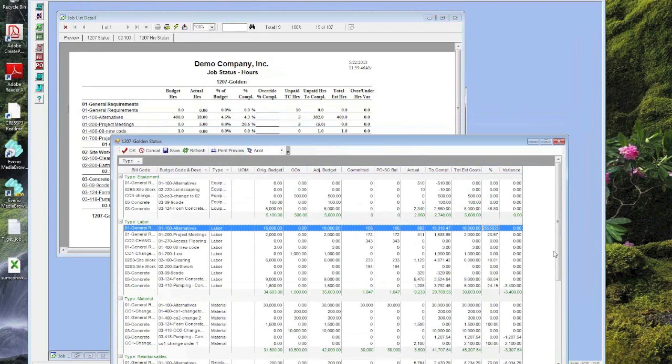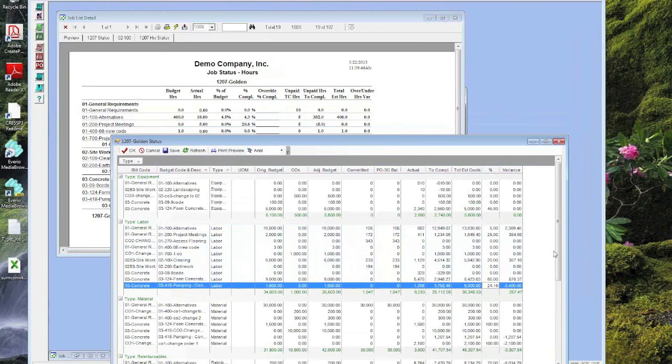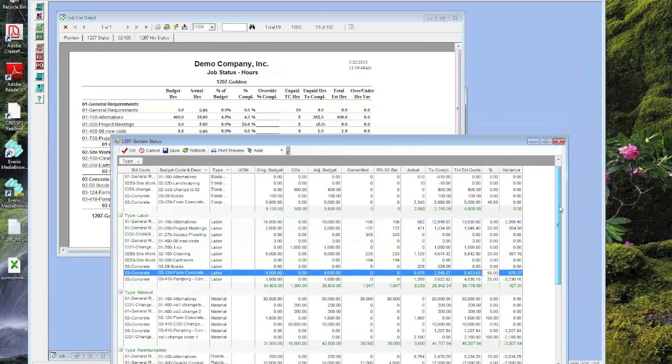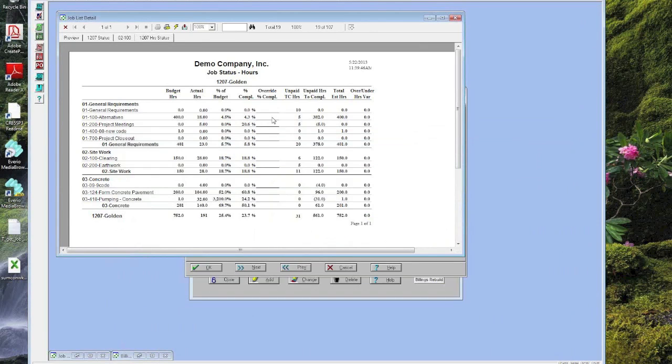And then you would use this job status grid as an accountability tool to project where you're at with the project. So based on the percentages they give you, you're going to take your adjusted budget and project your total estimated cost, so you have a weekly variance of where you're at on the project. So then you've got the information coming back from the field, and weekly accountability reporting.